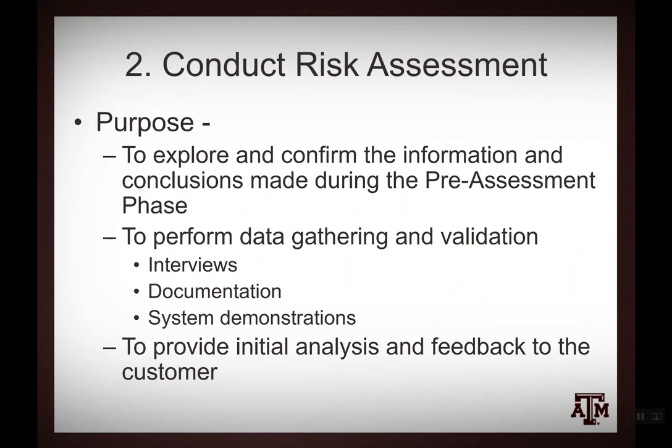The second part is to conduct the risk assessment. And you're going to perform data gathering and validations. You're going to use interviews. You're going to use documentation that's already there. You're going to ask for system demonstrations. Now, let me tell you about project management. Even before I did cybersecurity risk, I did knowledge acquisition and the like to build expert systems. And before I did that, I did systems analysis to build software for typically maintenance and logistics or inventory control of high dollar assets or the like. You interview, you take notes, you take what time it is, what room you met in, who was with you. You document this, you create an electronic document. Every interview, what I do then is my file title is the date and interview, so I can recall it. You document the interviews. Any analysis that comes from that, you also document.